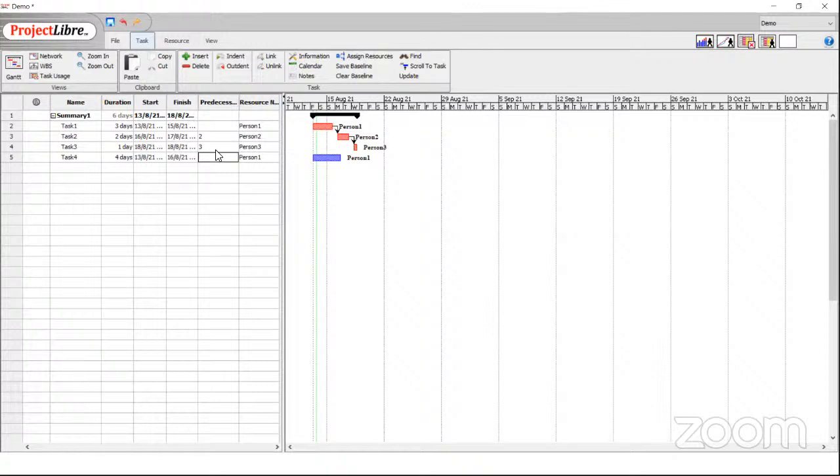And that critical path is the thing you guys, when you build your project plan, you have to watch it like a hawk. Why? Because the critical path directly defines your end date for the project. And any delay of even a single day in a critical path activity will delay your end date. And that is easily visible to you by what the Gantt shows you in red.